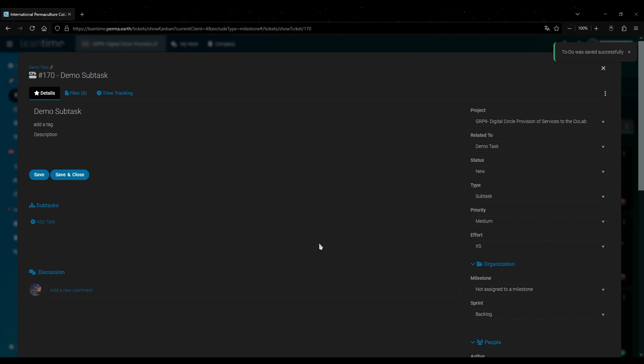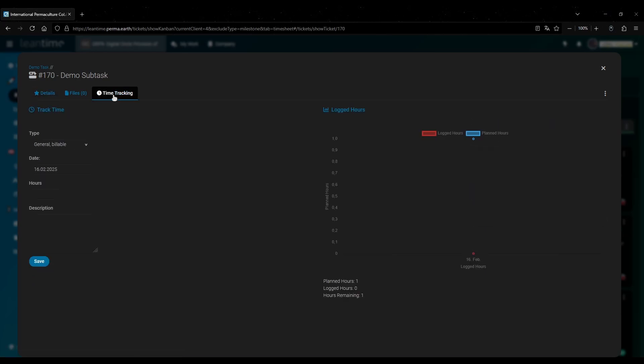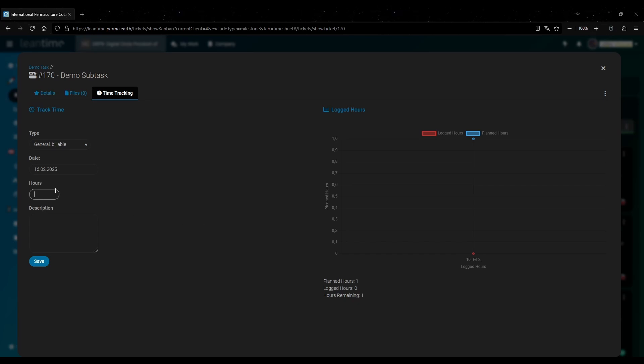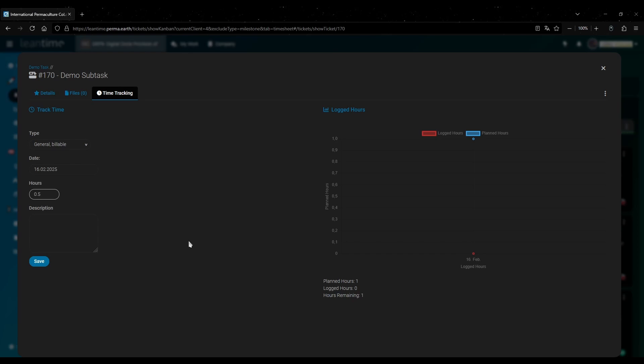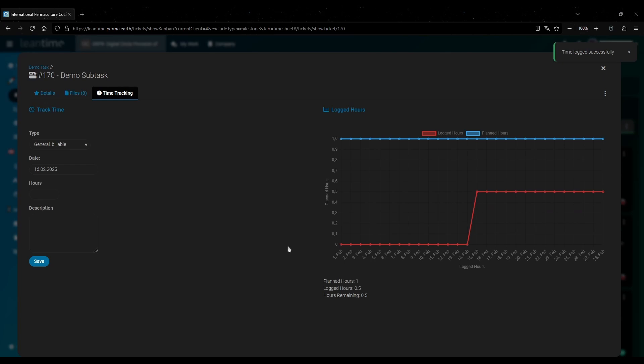When you want to log your time you click on the time tracking tab up here. This specifically tracks the time for the task you clicked on. And then you enter your time on the left. Let's say for example you worked on this half an hour. And then you save it. And then you can see that it's showing up in this diagram on the right here.